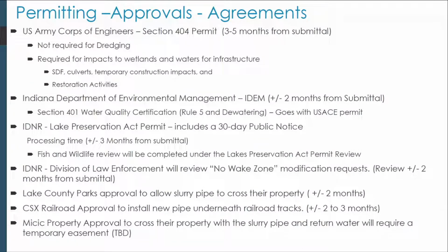We're going to have the U.S. Army Corps of Engineers. The dredging itself is not a regulated activity. What is regulated are the impacts associated with the infrastructure for the pump equipment. We're going to have to cross wetland areas with temporary road crossings and with the slurry pipes. And so those will be regulated activities.